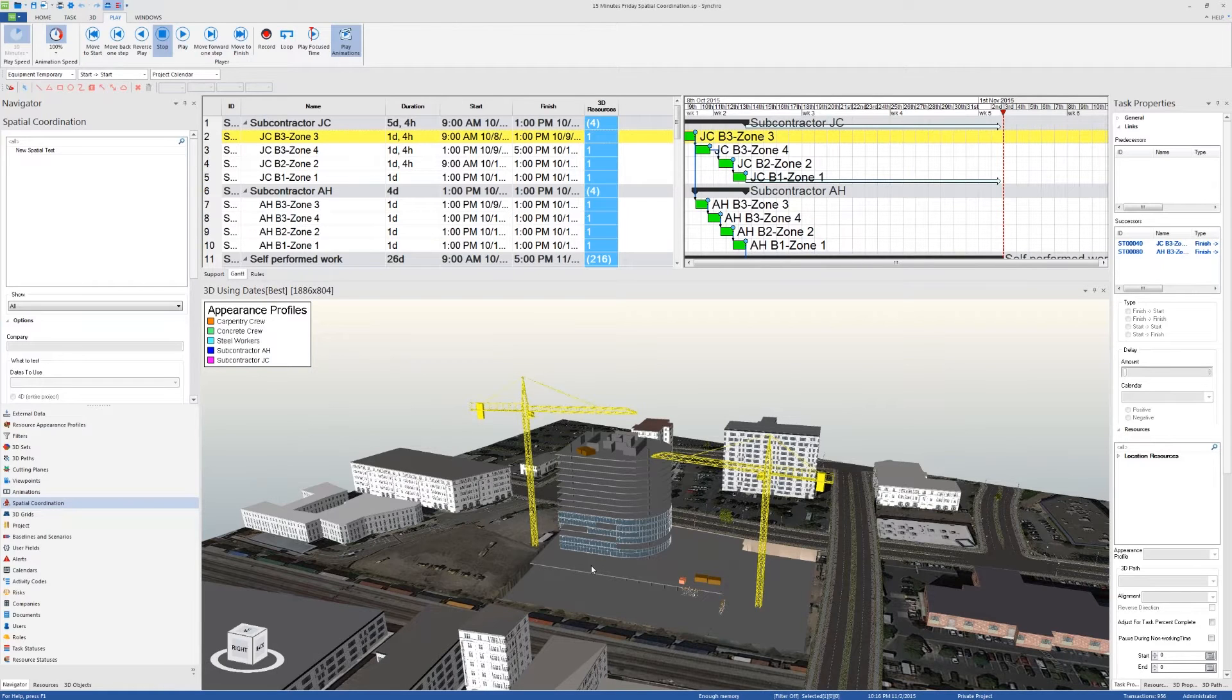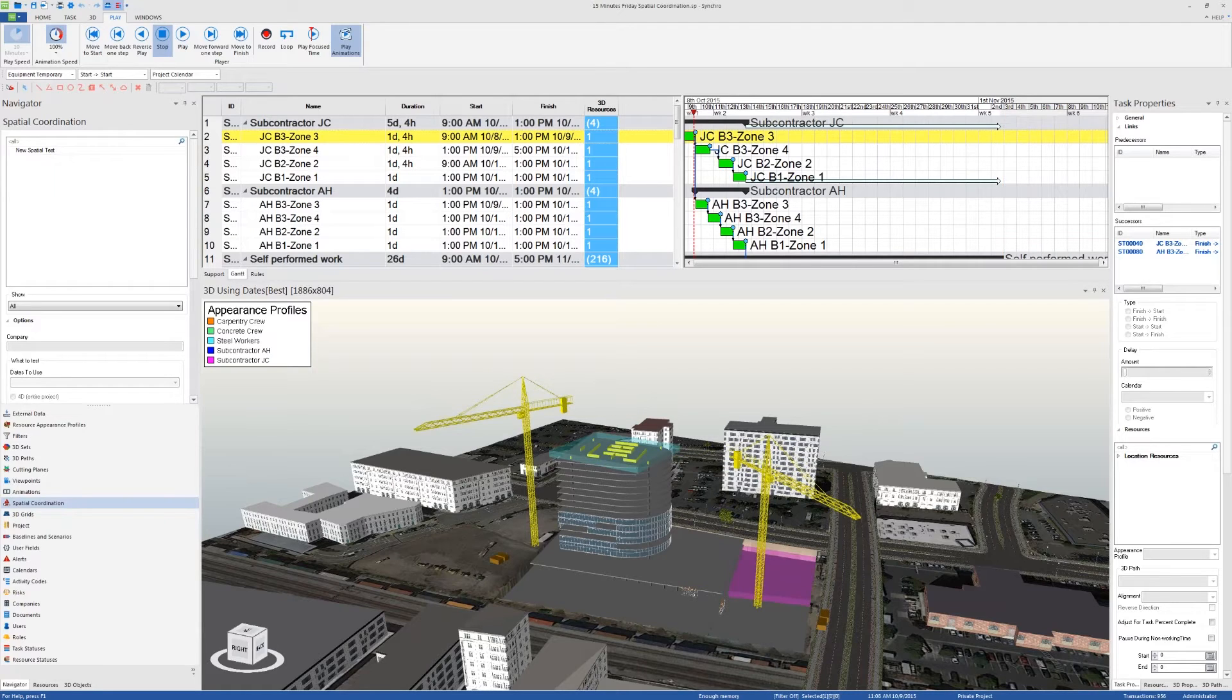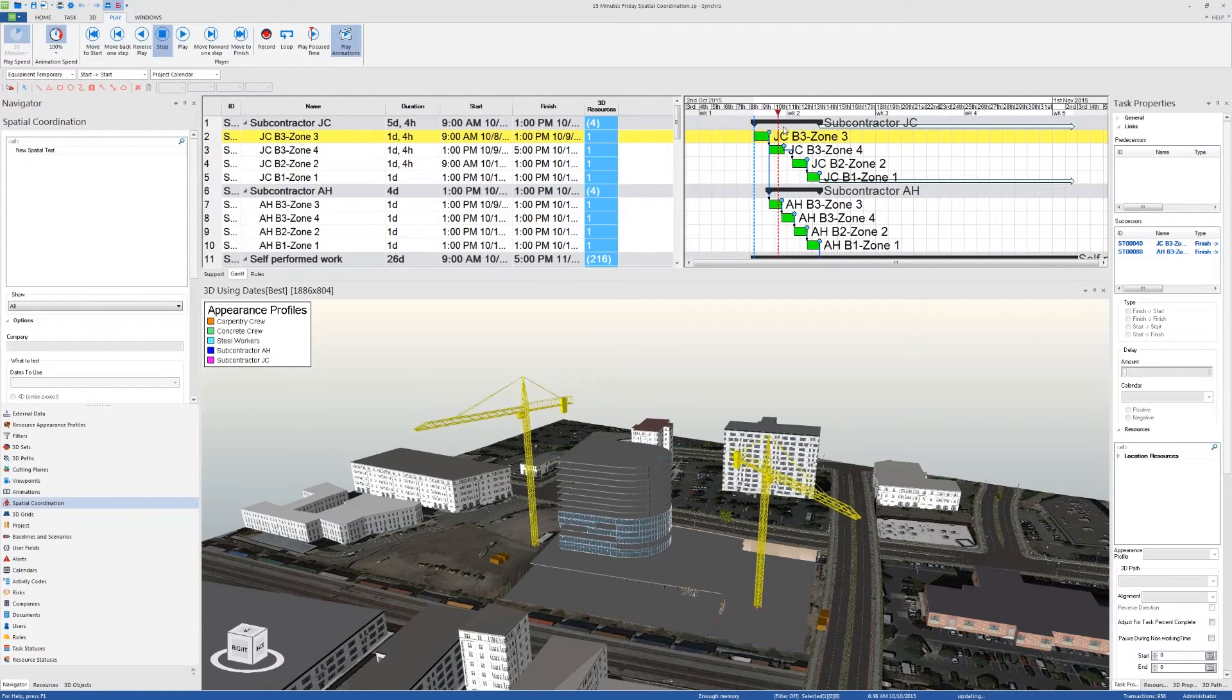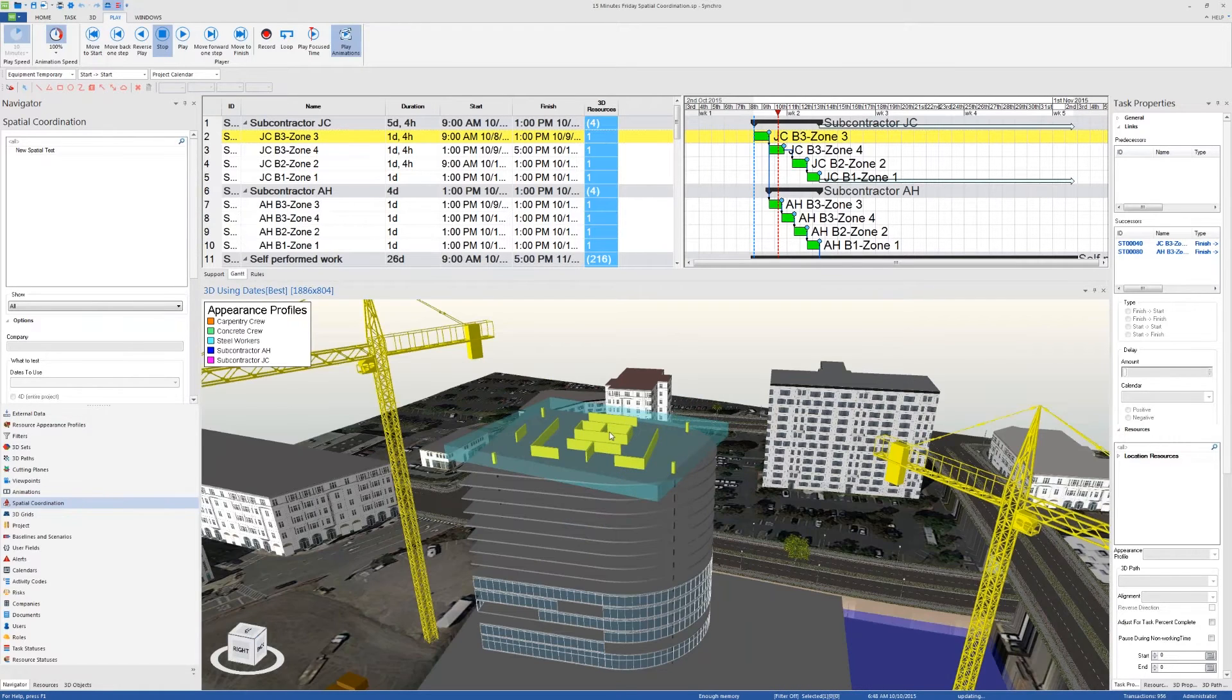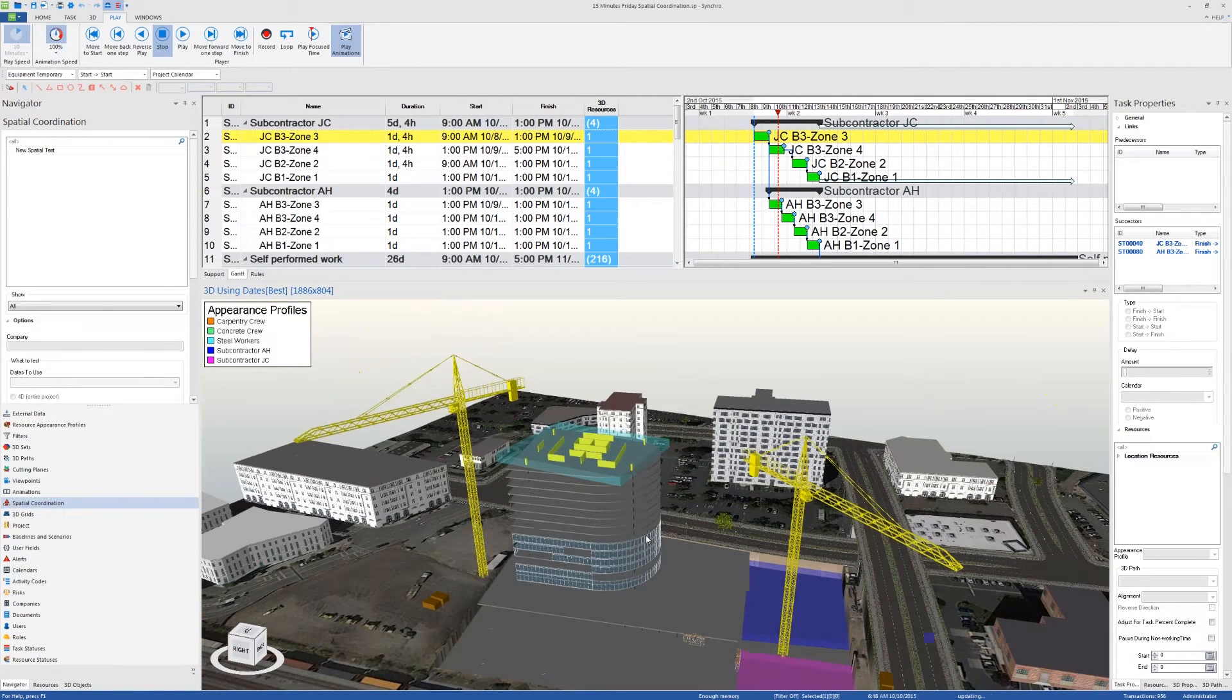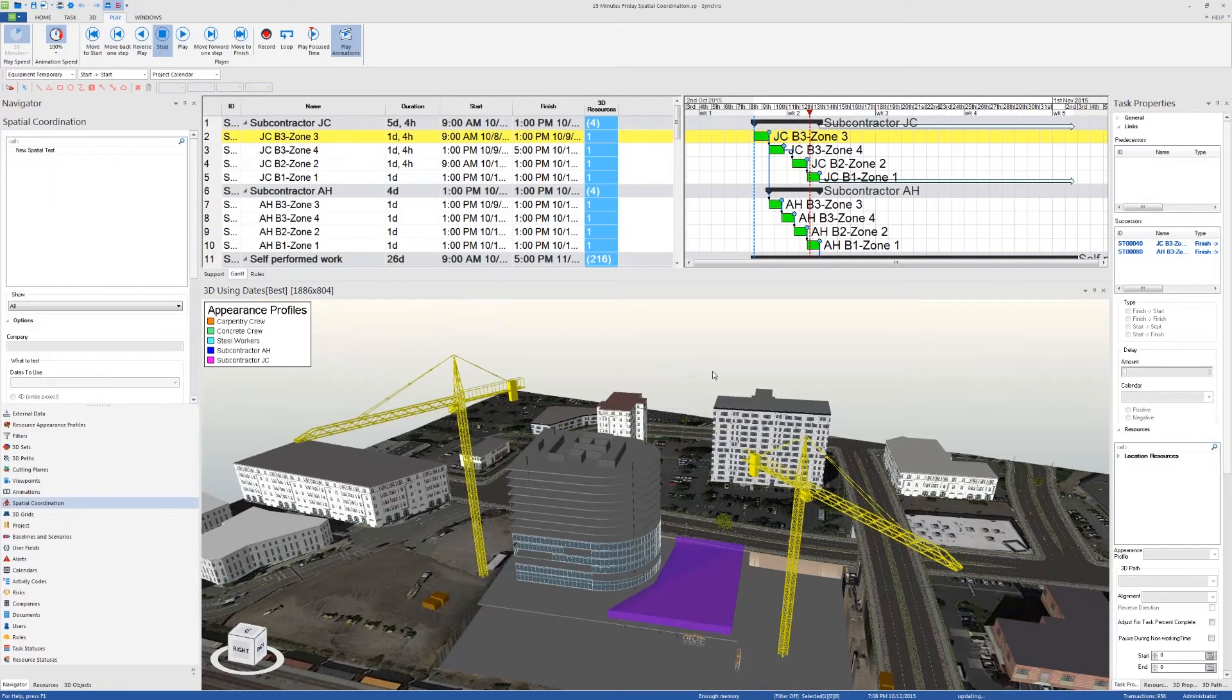For those of you who are not familiar with how workspaces are created in Synchro, you can either import them automatically from any BIM software such as Revit or IFC, or you can create them in Synchro Pro from a bounding box, shared bounding box like these sets of vertical elements, or by extrusion where you draw a shape and then extrude that like the workspace right here.